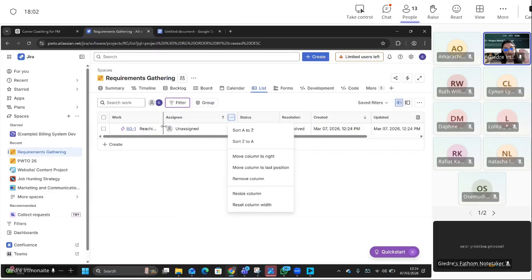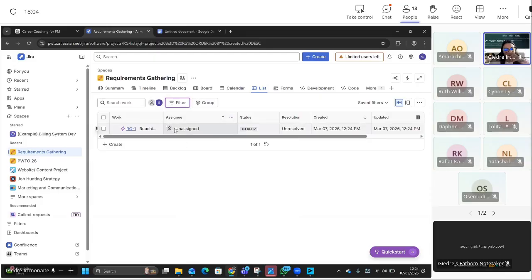So you can have an assignee, in the sense that if there are specific people who are going to be overseeing and making sure that requirement happens, you can assign them on this. Then it makes it easier for you to get progress. Right now we have a lot of requirements on the project that technically were there, but just didn't happen.